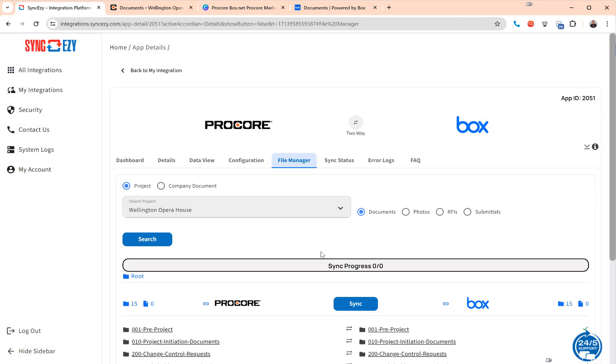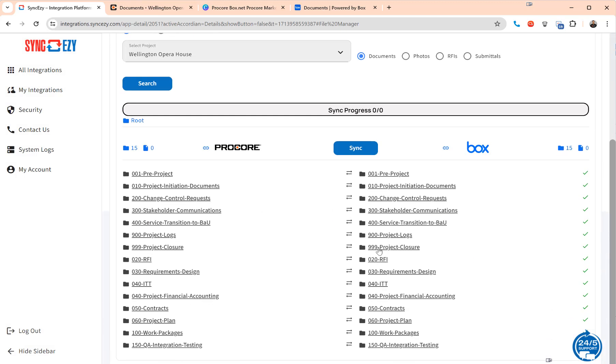So we show you everything within the file manager and once that is complete it will automatically start a two-way sync. So initially once connected it does a one-way sync from Procore to Box. Once that is completed it will automatically switch to a two-way sync.